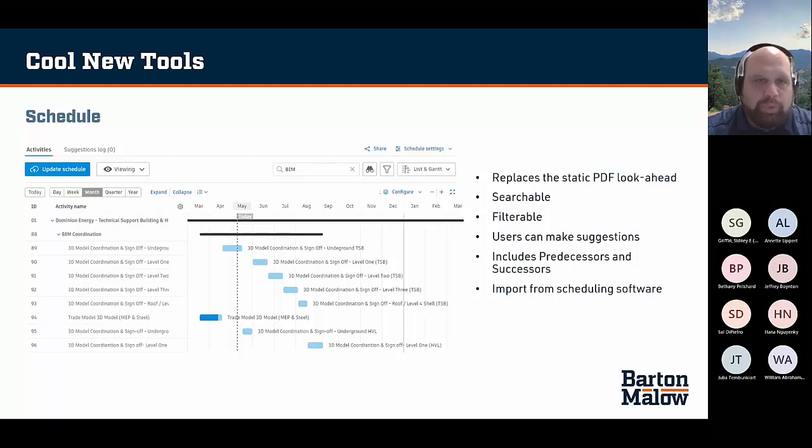The intent of the schedule tool is to allow the project management team who's working in P6 or Microsoft Project or whatever they're using to take that schedule and push it out to where other people can see it. Traditionally, at least on the construction side, we've done that through a PDF. Usually we'll do a couple, like the whole schedule, and then a 2-week look ahead, something like that. And the problem with that is, one, it's all 11 by 17 pages, and it's all text. I can't filter, I can't search, I can't sort, I can't do anything. So it's really limiting in what the end user of that PDF can do with it.